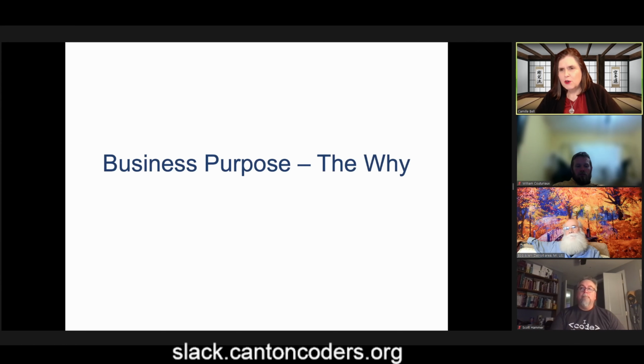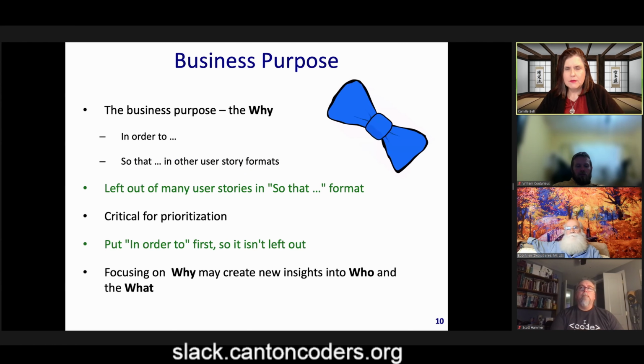Okay, so let's focus on the why. Because that's our business person. So traditional user stories, if you're familiar with those, are as a, I want, so that, which puts the why last. That's a mistake. You want to put the why first. Why is that important? Well, 1, it gets left out. 2, it's useful for prioritization. And 3, when you focus on the why, you may discover other things are different.